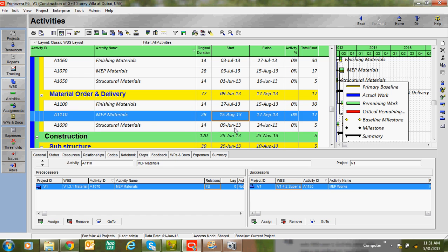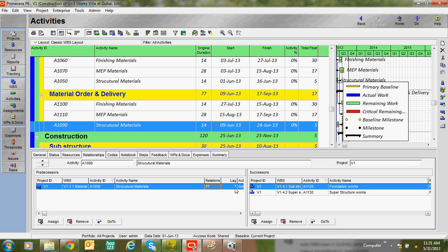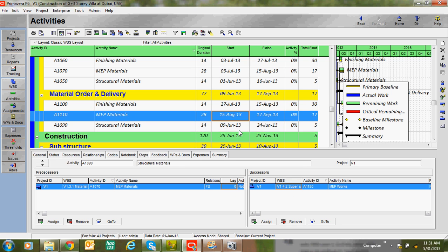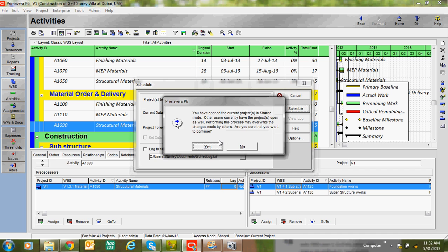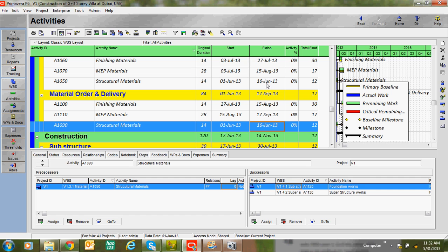The next relationship is Finish to Finish. Finish to Finish means: this material submission and approval finishes on 16th June, and if you want the material order and delivery to also finish on the same date — 16th June — just select the relationship FF and go to Schedule. Here you can see both show 16th June, meaning when the submission finishes, the material order also finishes on the same day.